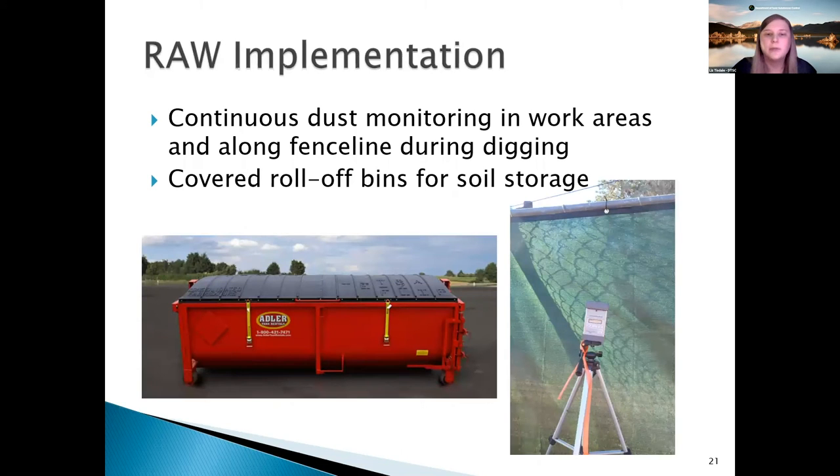And if you're unfamiliar, there's a picture on the right that shows a green screen on the fence. That's the dust screen. It's much better at preventing dust from traveling offsite than just the Kevlin fence would be. And then this little box on the tripod is a dust monitor. Dust monitoring will be occurring continuously at all times in the work areas and along the fence lines whenever we are digging.